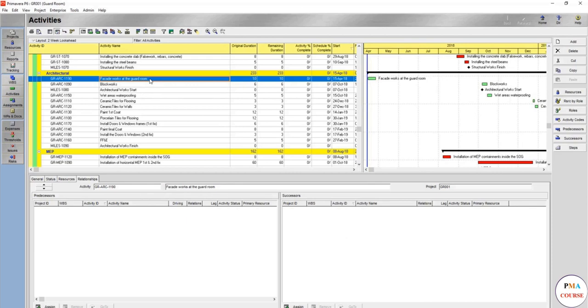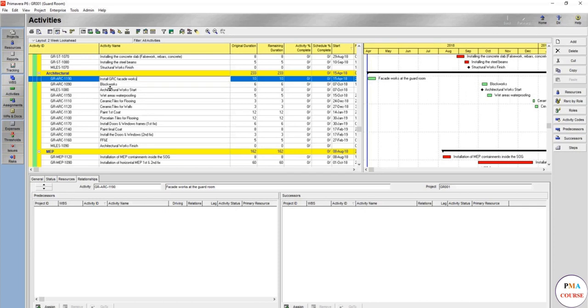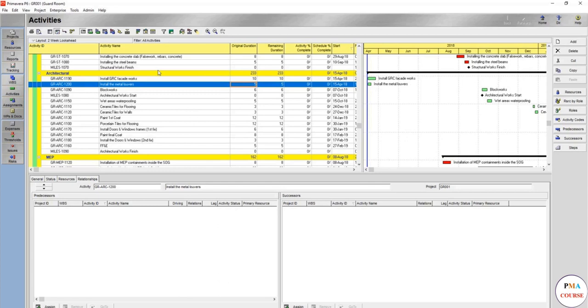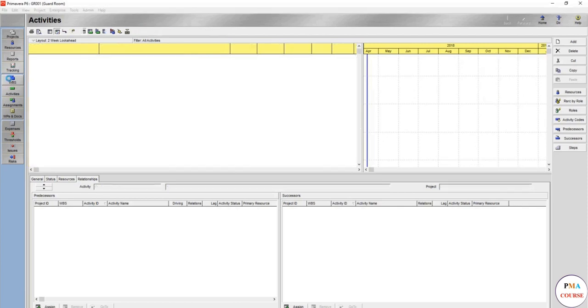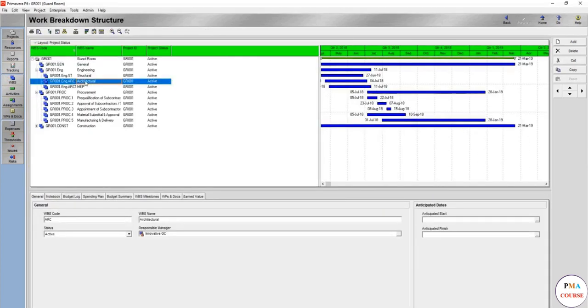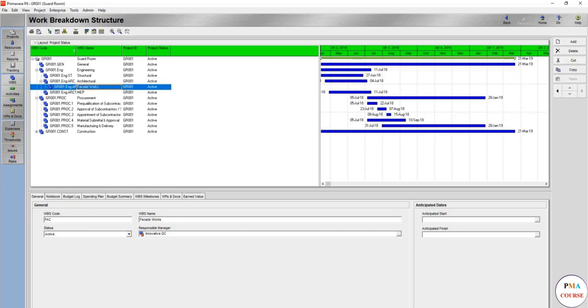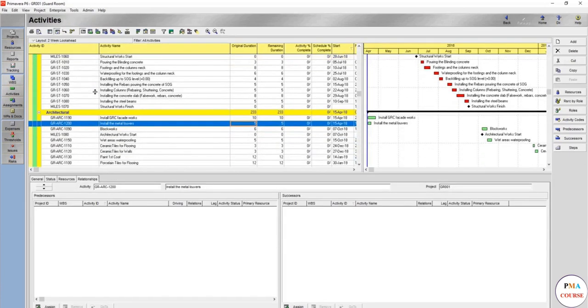Let's go to our activity and divide it into two different activities. We'll use this activity as one and make it install GRC facade work, give it 10 days, and add another one: install the metal louvers, probably sandwiched trap louvers, give it five days. I also recommend for facade work to add new WBS for only facade works under architectural works. We'll name this one facade.